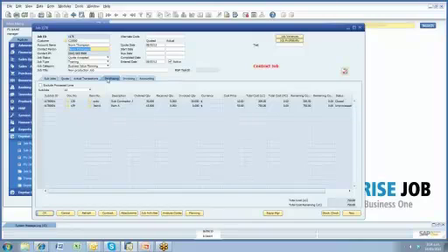If I was just, for example, needing a stock item on a job and I pulled it out of my standard inventory, well then it'll be doing a stock transfer, of course, onto the job, but it uses the standard Business One rules of what the cost of that item will be.